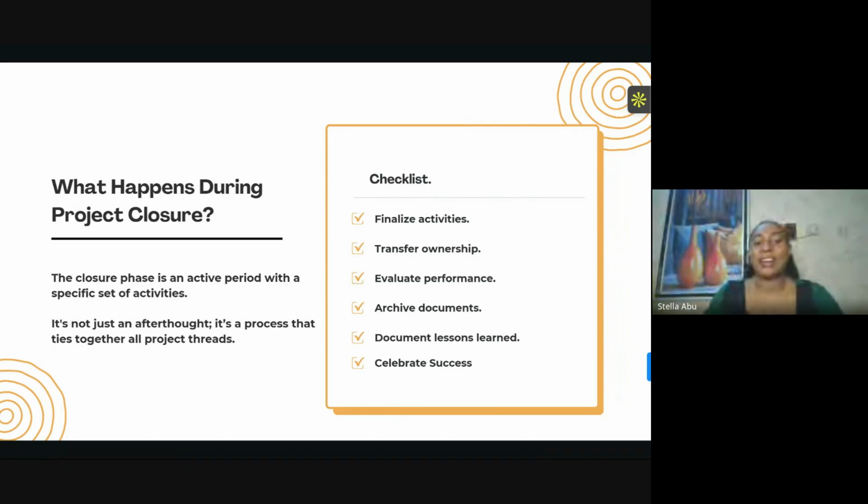The third thing is evaluate your performance. I just explained that now, right? Look at what I have done based on the cost, the schedule, the quality. Have I been able to meet up with my plan, right? You've done a whole lot of planning. You've delivered your project. So what have you done so far? Have you been able to deliver based on your plan, right?